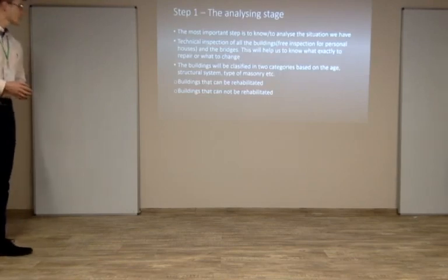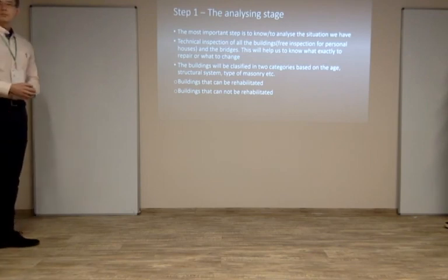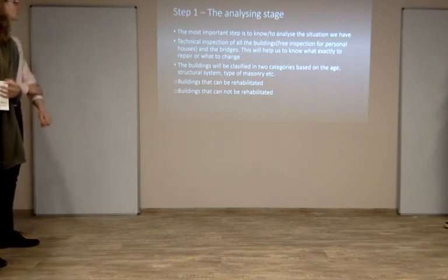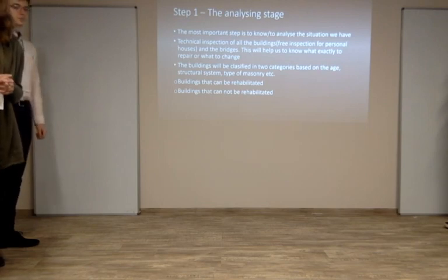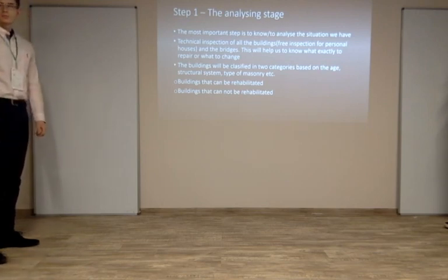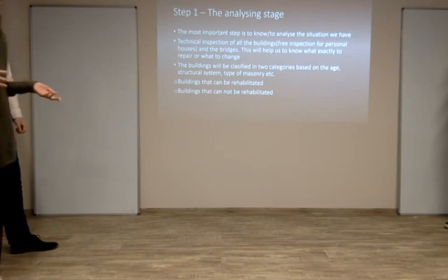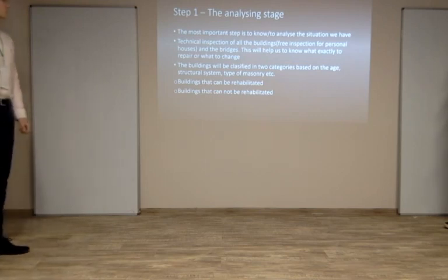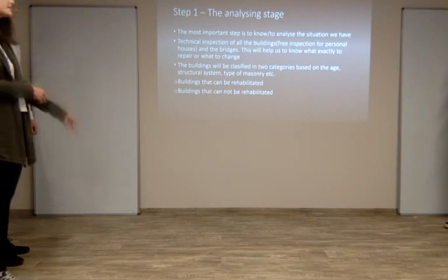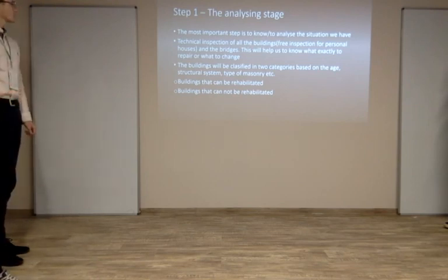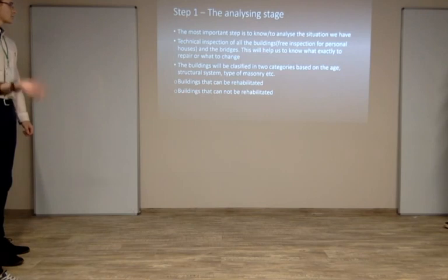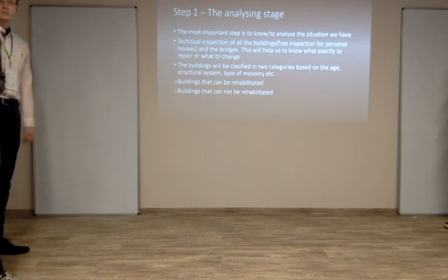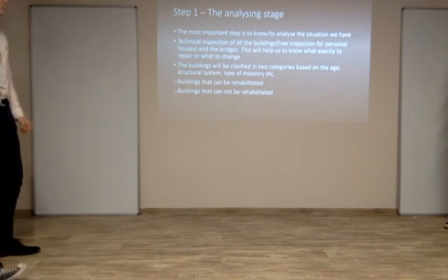The first step is the analyzing stage. The most important step is to know and analyze the situation we have, so we know exactly what to do. Technical inspections of all the buildings. This includes free inspections for personal houses and for the bridges. This will help us know exactly what needs to be done. The buildings will be classified into two categories: buildings that can be rehabilitated and buildings that cannot be rehabilitated.